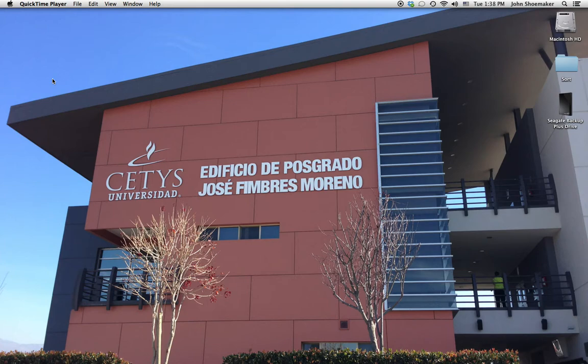And what we do is generally we get the team members and other stakeholders, people who are knowledgeable about the project and the environment within the project situation, and brainstorm potential risks. The question becomes, well, how many risks do we list or do we identify?